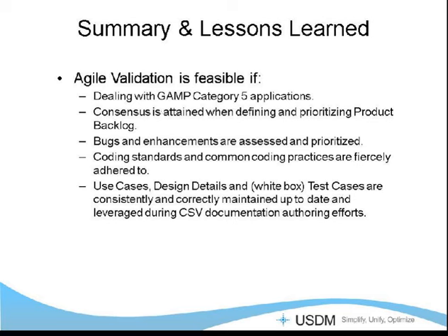again, the biggest thing is our approach was we essentially held all of the documents open, if you will. So as we were going through these iterations, as we were going through this Agile development, the requirements document stayed open. We used the system and what was built in the system to define what the requirements were. So until we were ready to finalize an iteration and put that first deployment into production, we still had open requirements. And so